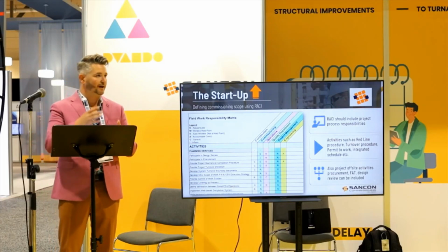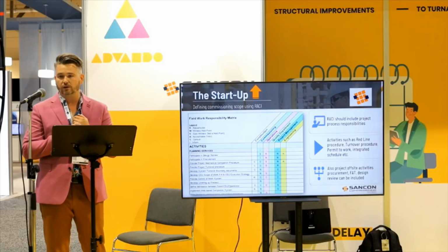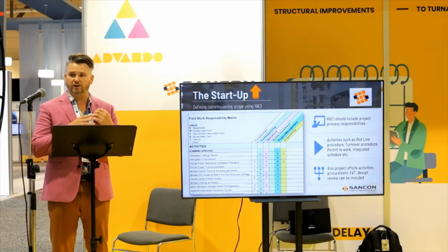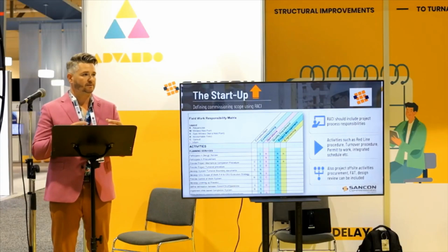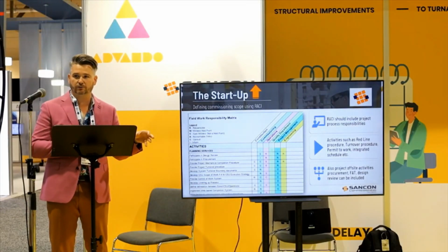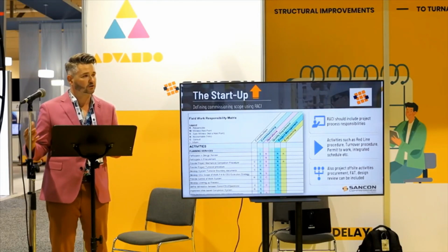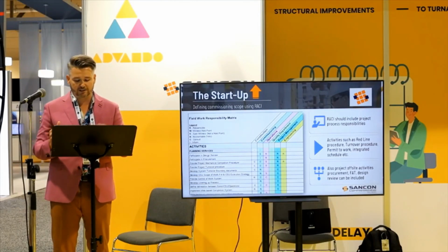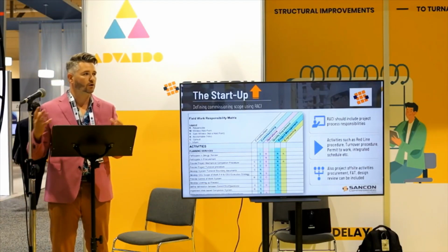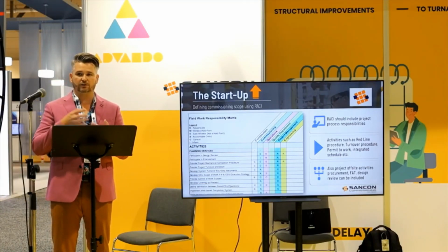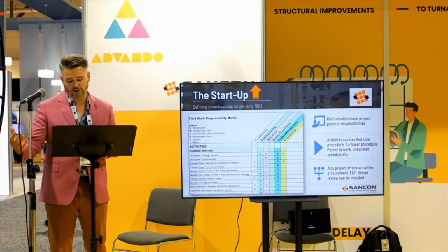So within the planning service, our scheduler, who's responsible for updating the schedule? Which contractors are updating which portions of that project? Who's responsible for red lines at this time? Is it pre-turnover construction is managing red lines? We switch into turnover to the commissioning contractor. Now that responsibility gets shifted. These are clear things that should be defined in the responsibility matrix, so we know who's responsible, who's ultimately responsible for turnover, care, custody of as-built drawings of a project.